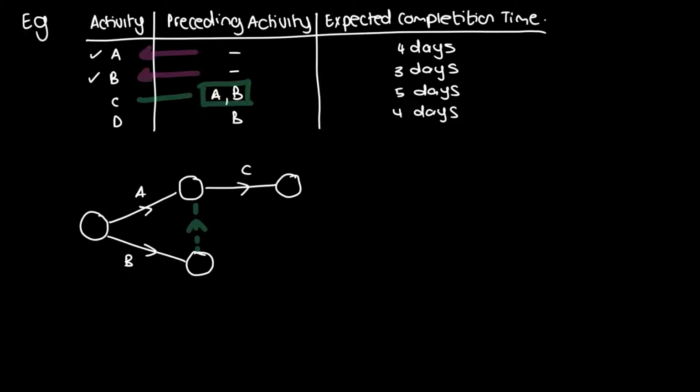And I'm following the approach of let's just draw it and we can neaten it up as we go. So now we have activity C on our graph, and we move on to the next one. So the next one is activity D. Okay, so we have activity D, and activity D requires activity B. So out of the ending event of B, activity D needs to occur. Now, at the moment, I'm going to draw it like this. It would be something like that with D.